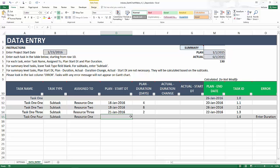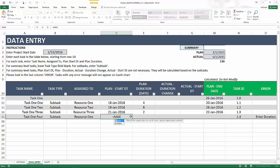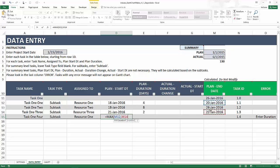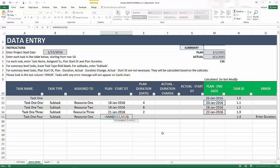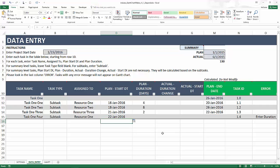In order to implement that dependency, I am going to click in the cell, type equals, then I'm going to type max, open the parenthesis, and then I'm going to choose the end date of the task 1.1 and 1.3. Let me do it again: equals max, and then click on the cell here, it'll be M12, I'm pressing the control key on my keyboard and I'm pressing the task 1.3's plan end date. So now I have two cells selected and I can close parenthesis, hit enter.